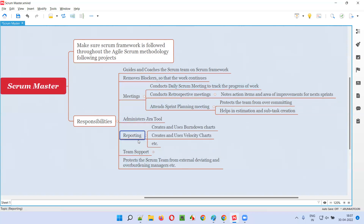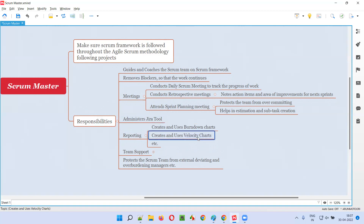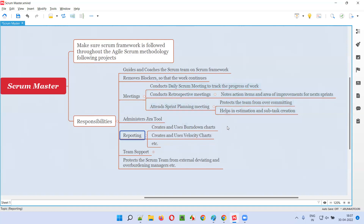Coming to reporting, nowadays most reporting is done automatically by tools like Jira. However, if working without Jira, the Scrum Master has to create a burn-down chart and use velocity charts to track the speed of the team. These different types of reports are used in the project to see where the project currently stands.